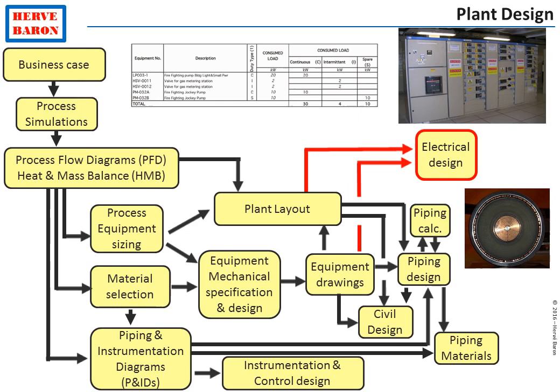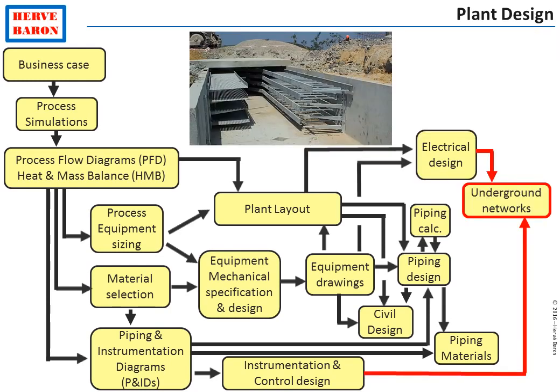Power cables are sized and their routes are defined, and since these cables are installed underground, such information is provided to the civil engineer, who performs the underground networks layout drawings. Quite a few networks are located underground, and the civil engineer coordinates their respective positions.